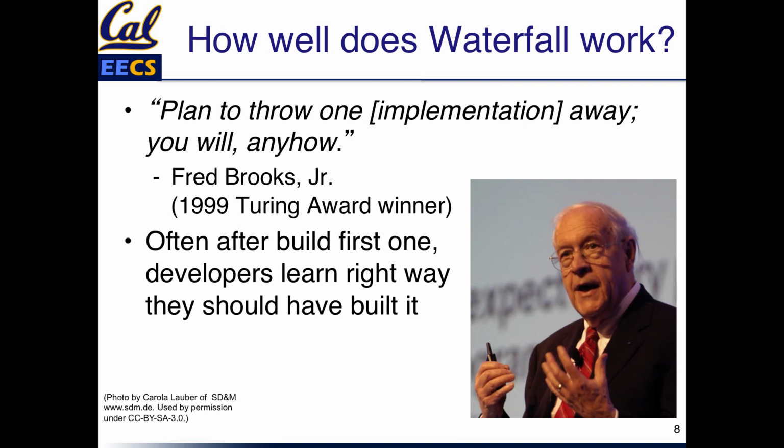Another one is from Fred Brooks, and his phrase is, throw the first implementation away, you will anyhow. So Fred Brooks is one of my personal heroes, and we'll quote him a couple of times. He won the Turing Award in computer science and is author of a famous book in software engineering called The Mythical Man-Month. Basically what happens is developers, once they build the first one, then they get an idea of how it should have been implemented, and if they threw it away, they could do it again better. So kind of this is the problem with the Waterfall lifecycle. They would build software that customers didn't like, and then after they built it, they realized the right way to do it.